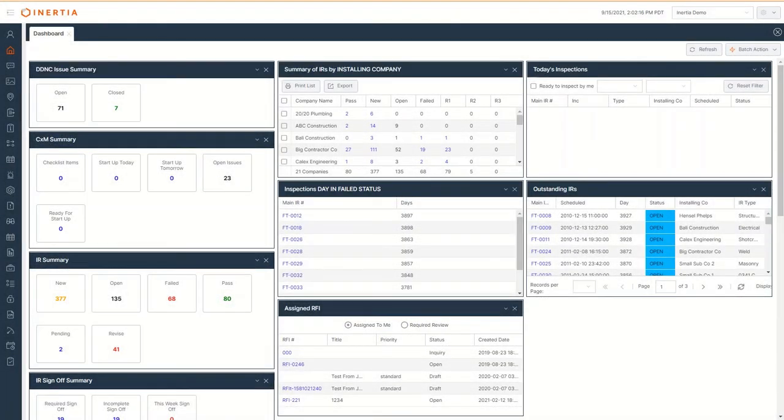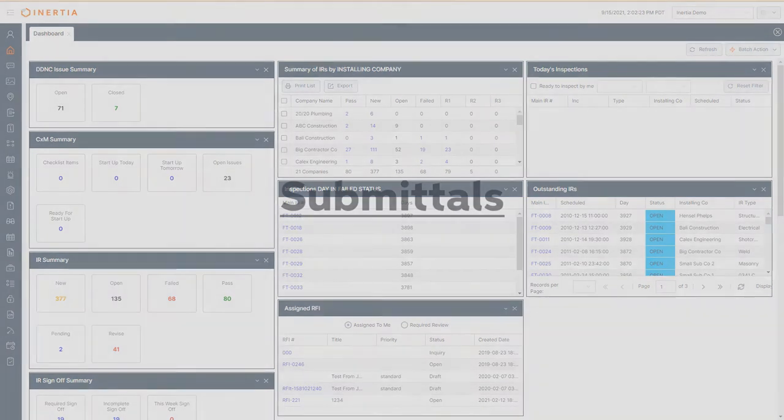In today's video we're going to review the submittal module and workflow a submittal from draft to acceptance. Submittals are the prime communication method for the construction team to receive approval from the design team on final selections